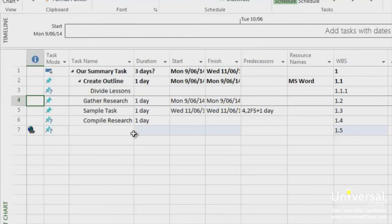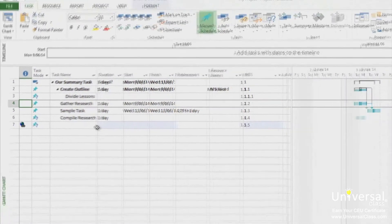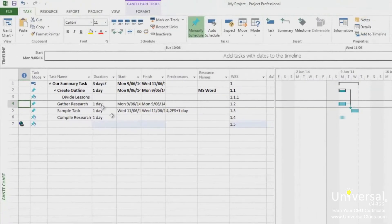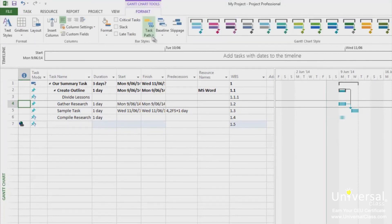Whereas Task Inspector lets you see your task drivers in a table format, Task Path will show you task drivers by highlighting them in the Gantt chart. To see your task paths, go to the Gantt chart view if you're not already there. Go to the Gantt chart format tab and under the Task Path button, select the Task Path that you want to see.